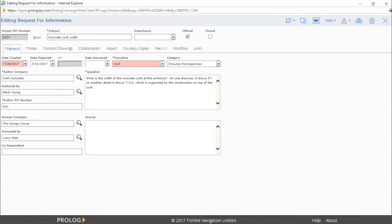In our example, the RFI discipline field on the general tab will be used as the criteria to automatically select the RFI civil template and route this RFI to civil engineers for their input prior to the architect submitting an answer.